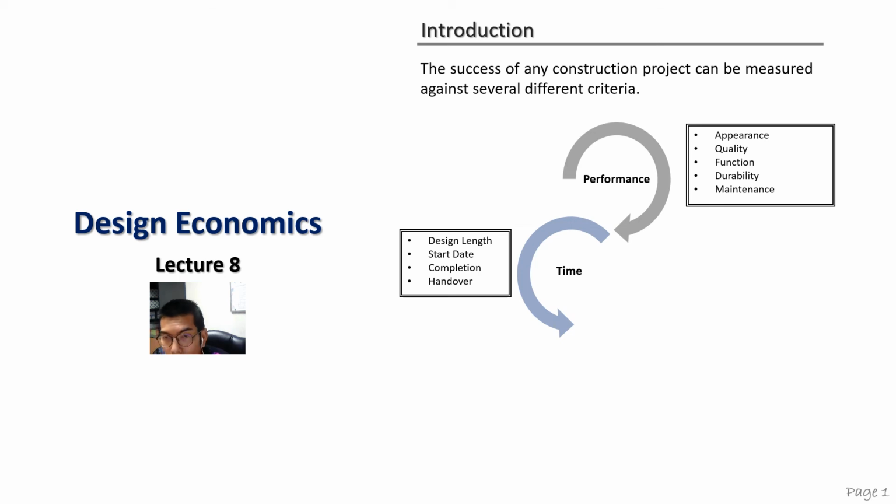Every critical decision must be decided first, so that when you move towards the construction stage, you will reduce unnecessary problems, for example design changes and so on. If you make changes in design, of course, your construction time will be dragged and you cannot complete your project within the stated time. So that's one of the problems.